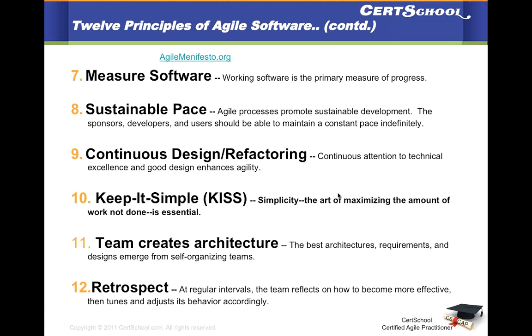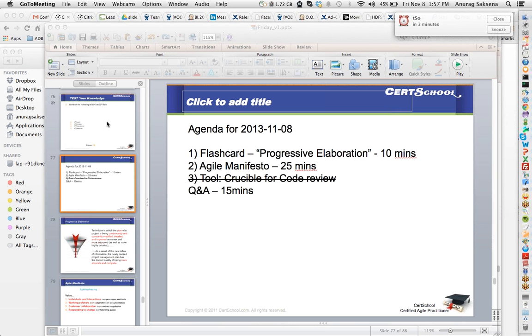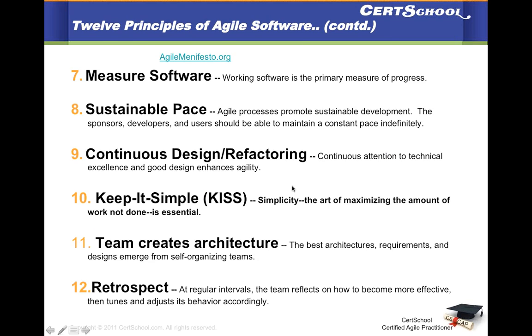When the requirements evolve, if you're putting that evolved requirement into the existing story itself, that is scope creep, which you should avoid. Instead, you want to create another story, which may be an enhancement on top of what you're doing right now, so that you can build on top of that. Okay, hopefully that answers that question.